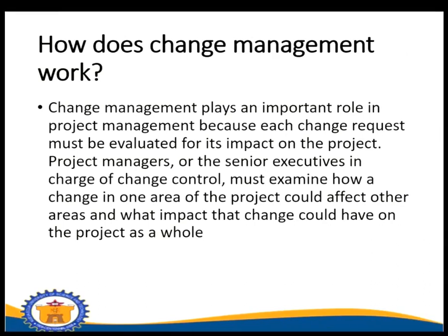Change management plays an important role in project management because each change request must be evaluated for its impact on the project. Project managers or senior executives in charge of change control must examine how a change in one area of the project could affect the other areas and what impact that change could have on the project as a whole.